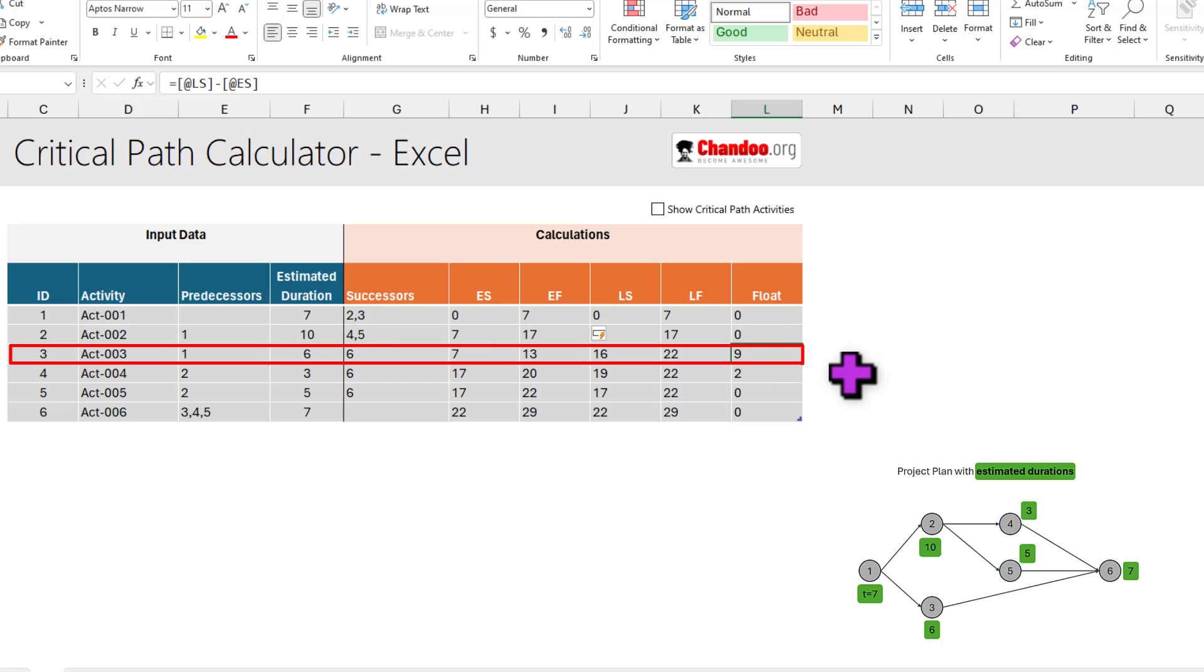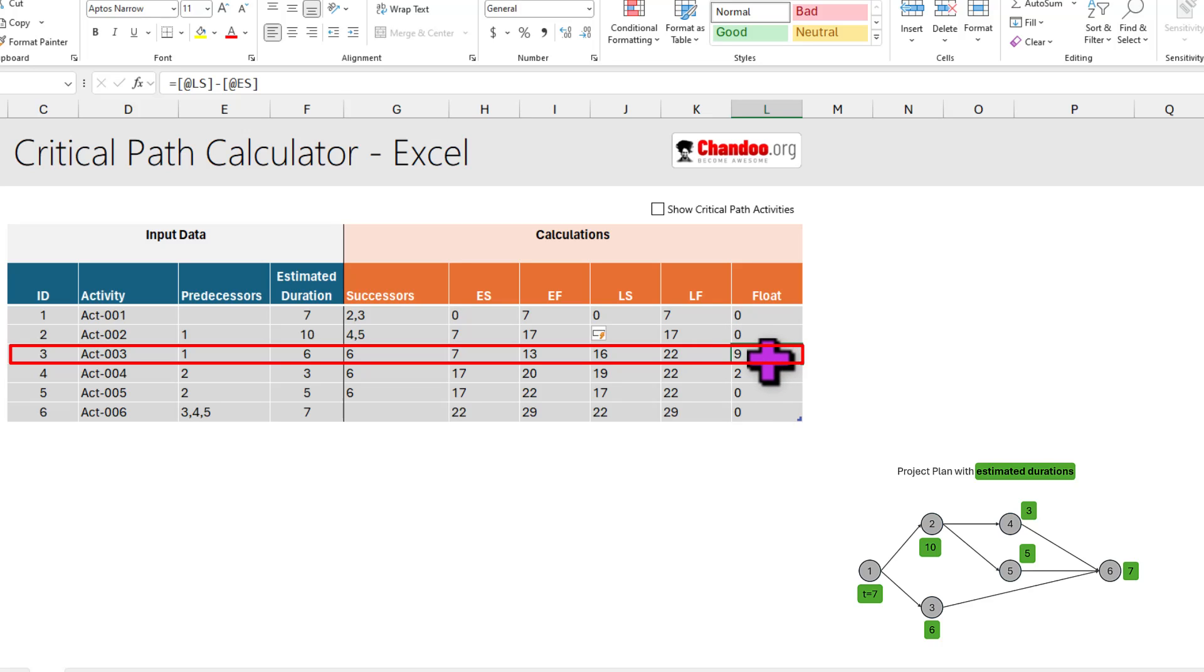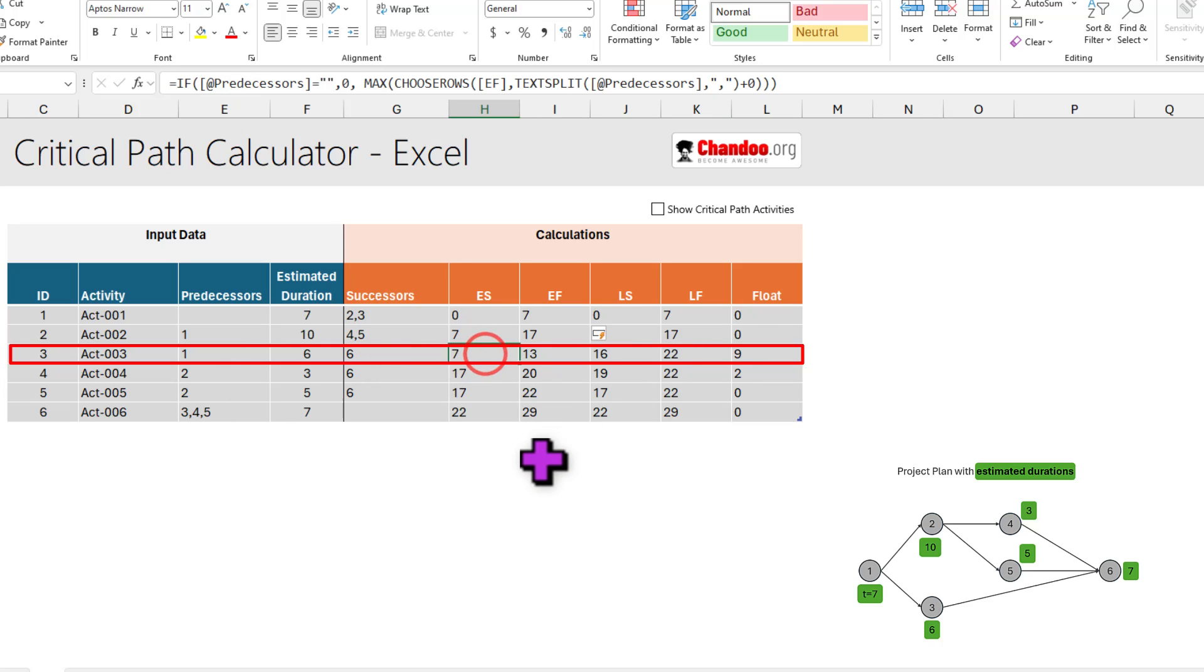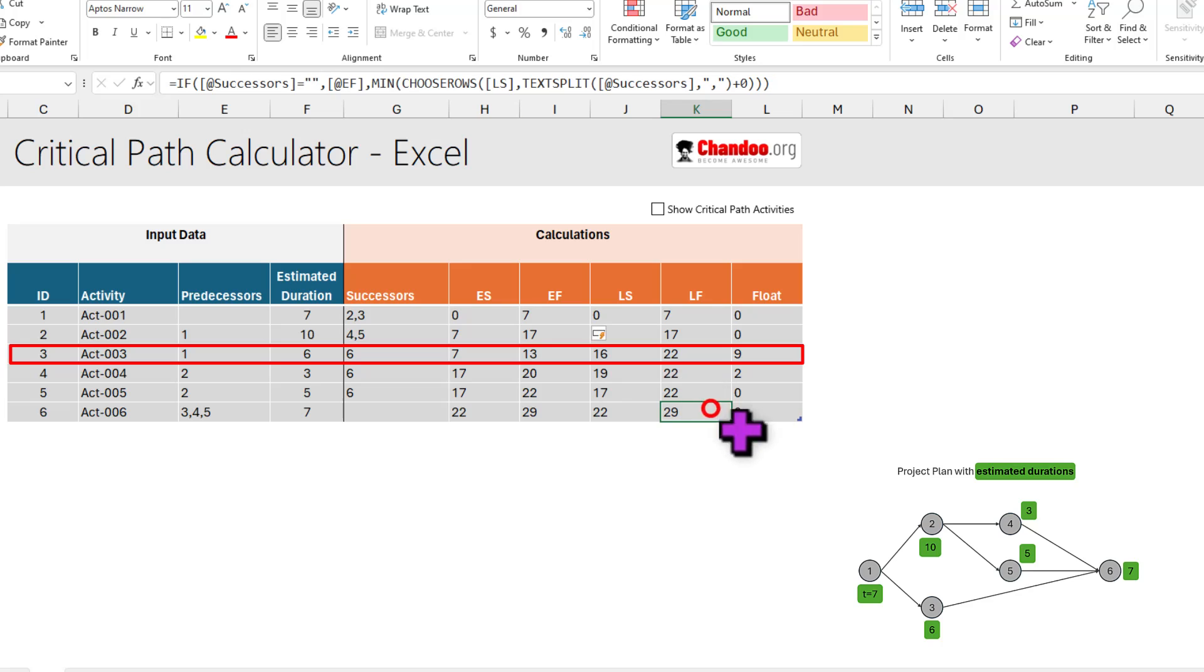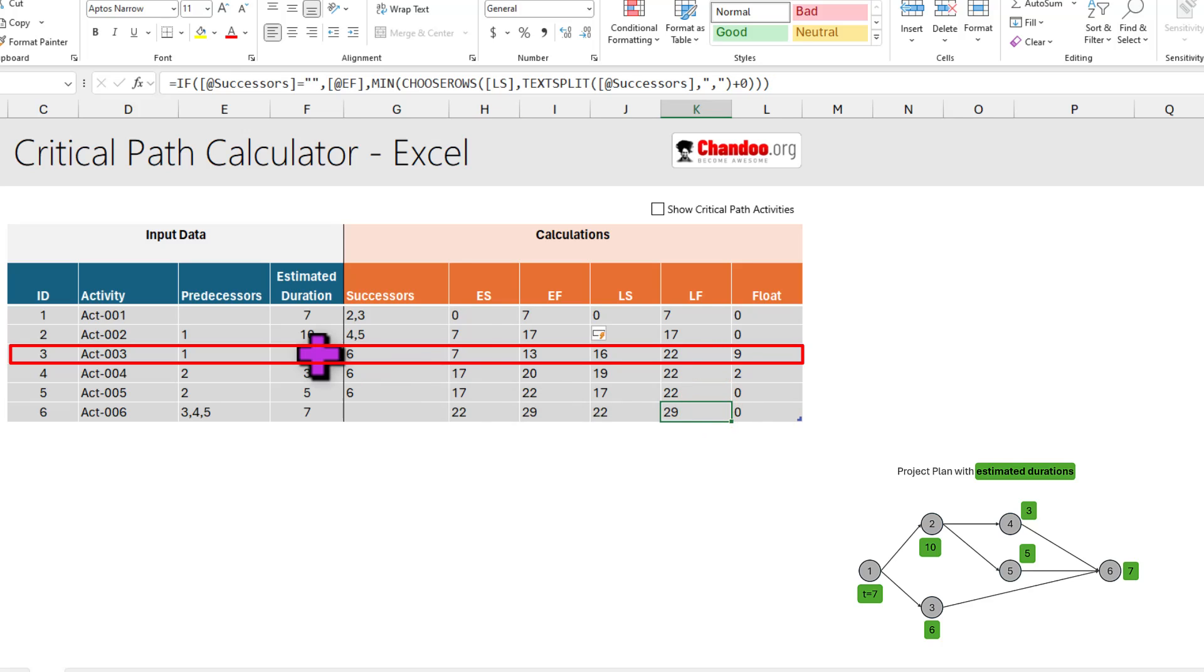For example, here activity three has a float of nine. What it means is, you can delay this activity by as much as nine days without changing the overall schedule of the project. So even though it is supposed to, for example, begin on day seven, you can start it any day, not just on day seven. Let's say the person who's supposed to do activity three is away. You can start it on day nine and you will still be able to meet the goal of the project and finish it on day 29.